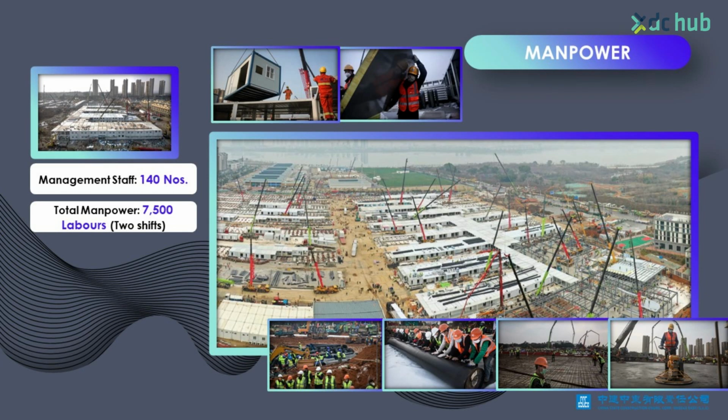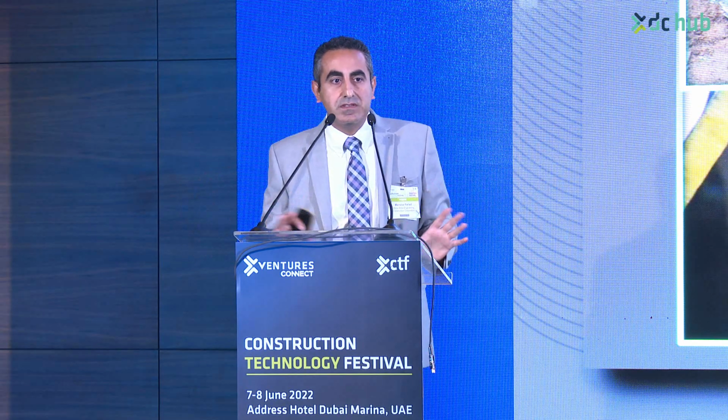At the end, they have more than 7,500 laborers on site during these 10 days for 24-hour operation, along with 140 members of the management staff. They use two systems. It's a prefabricated system, but they use it in two ways.